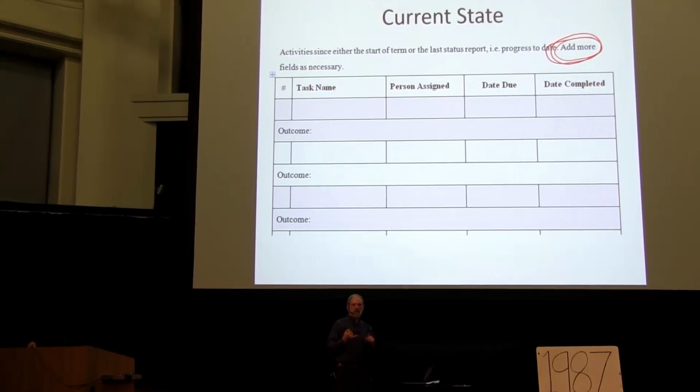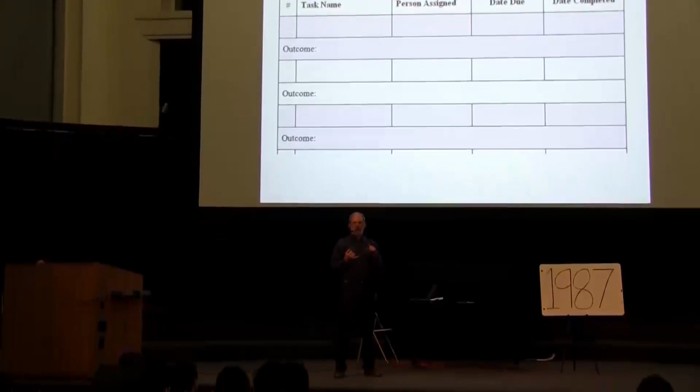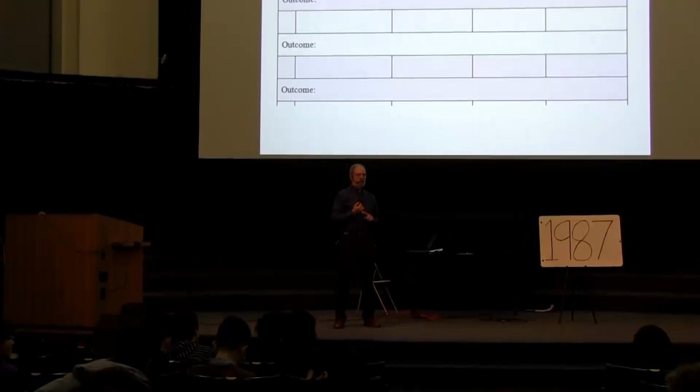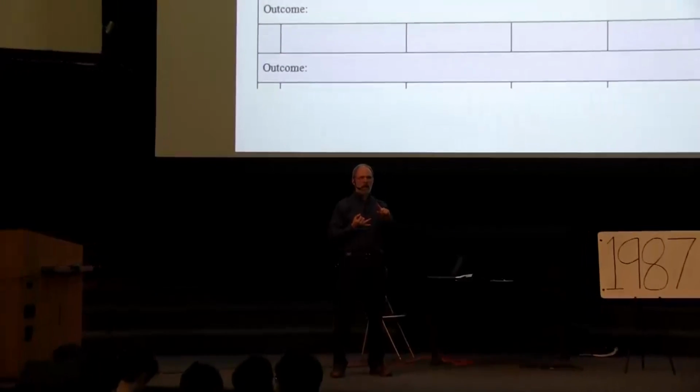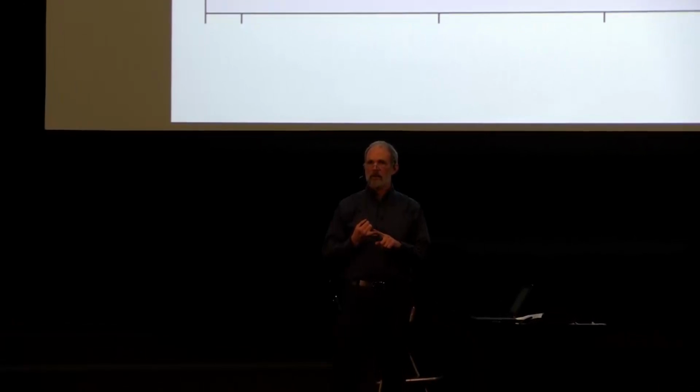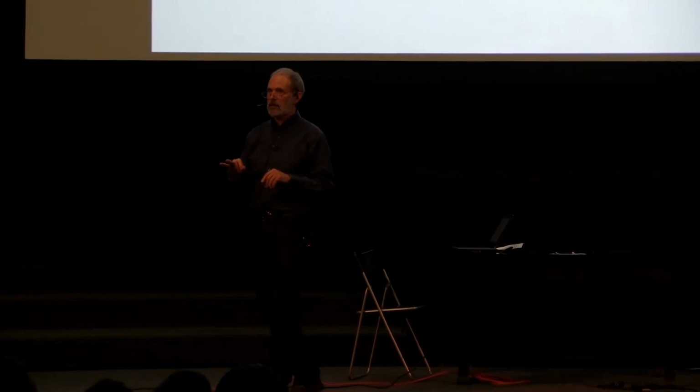A couple of things that people always miss: shipping and taxes, and accidental destruction of property. So you've got to add yourself a buffer when you're doing costing. You're going to be doing costing on your projects.